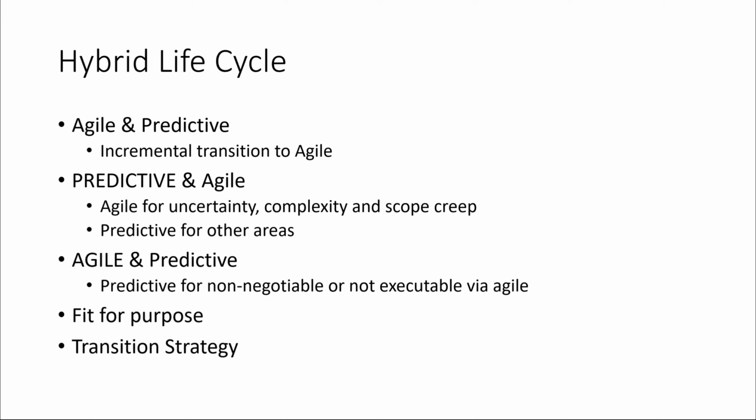A government department had a credit insurance application development project. The multi-year project was to replace its aging underwriting system with a new, more responsive user interface and system integrations. The bulk of the project was undertaken using an agile approach with continual business input. The premium rate calculations were handed down from the Organization for Economic Cooperation and Development as a 200-page specification. The steps were clearly explained with very little opportunity for confusion and were coded up by a separate team working its way through the calculation steps.